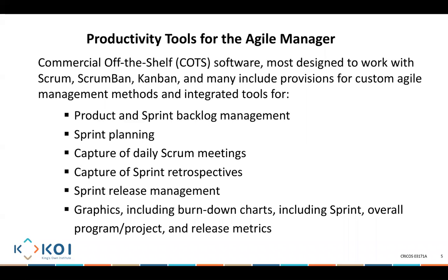How long will the system say I still need to have? I repeat the question. 5 hours. So if I already had 10 hours, and I have 5 hours that I've already done, the system will have a graph that is going downward, okay? Which tells you we had 10 here, and now it shows you we are here and we have 5 hours left, and between here and here, you are having 5. So this burn down chart shows you how many more hours I still need to go and finish.